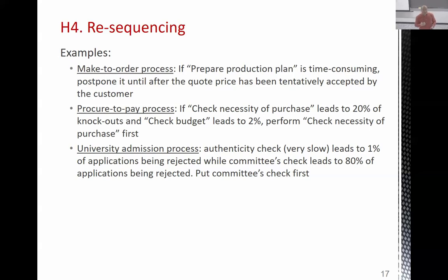So obviously what they did was they prepared a bill of material because this is important in order to determine the cost. And then they just estimated the amount of time that was needed to produce that metallic structure, but they did not build a production plan for it. Instead, in order to estimate the time, they took similar works that they had done before, and from there they found the most similar order they had got before. They calculated how much time it took to make it, and they used that as their delivery time. And then they started producing quotes in this way. No production plan, just taking an estimate of the time it takes to produce the metallic structure and then proposing that to the customer.